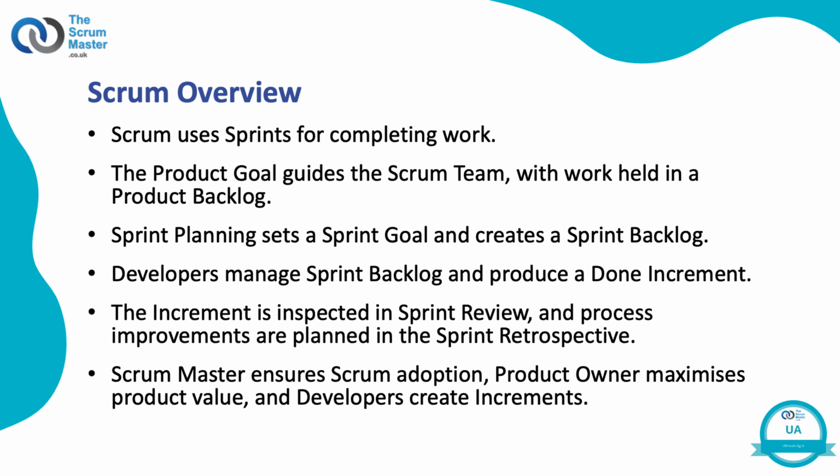Producing a usable increment that meets the definition of done and achieves the sprint goal each sprint exposes issues and helps the team understand the risks and challenges they face. Finding such issues from the first sprint ensures the Scrum team has the maximum possible time to resolve them.